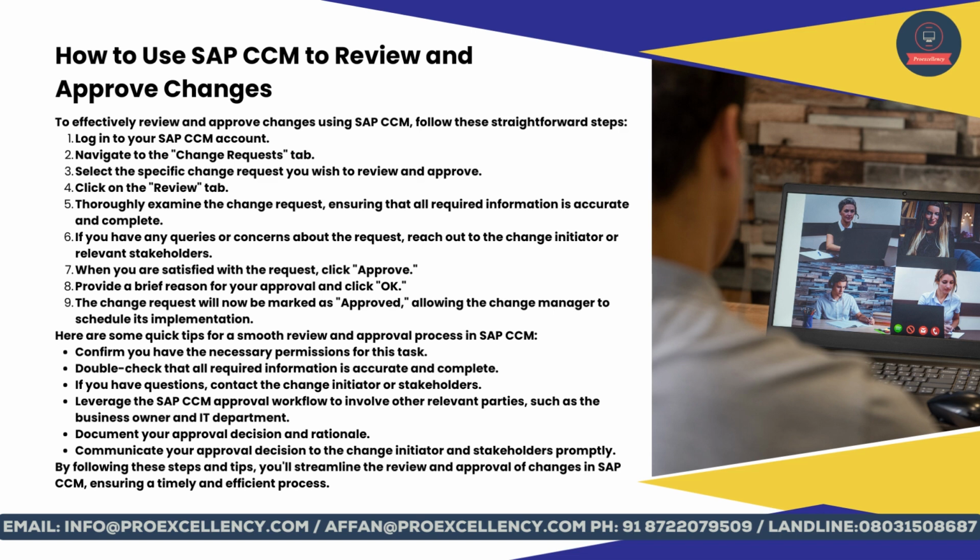When you are satisfied with the request, click Approve. Provide a brief reason for your approval and click OK. The change request will now be marked as approved, allowing the change manager to schedule its implementation.